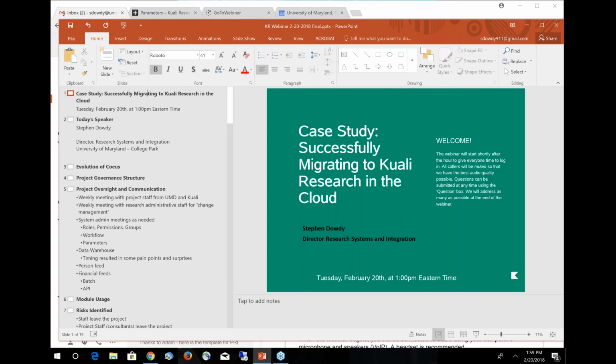Change management at MIT was a little bit different because they were going to go on-prem. And so they had a larger team, and anything that anybody said they had to have, it became: where do we slot this into the development, how much is it going to cost, and are we staying within budget? So their change management was more like gap analysis than change management.